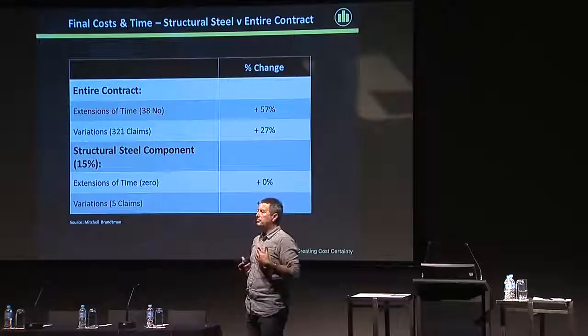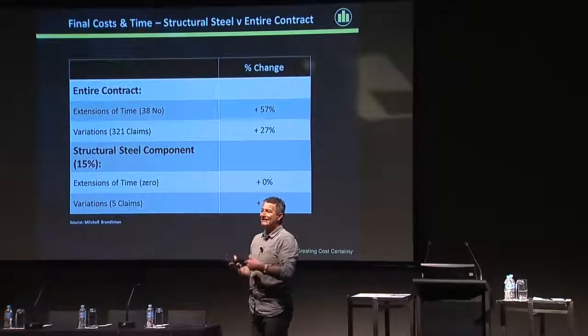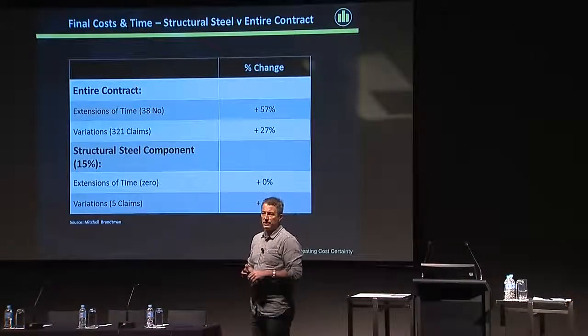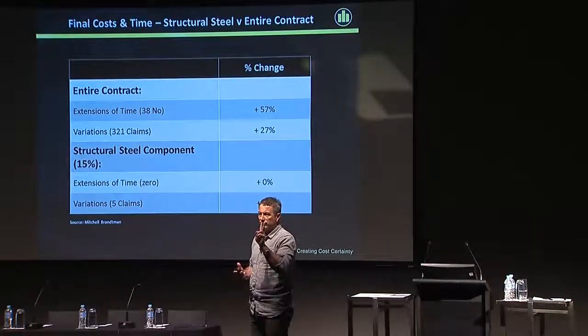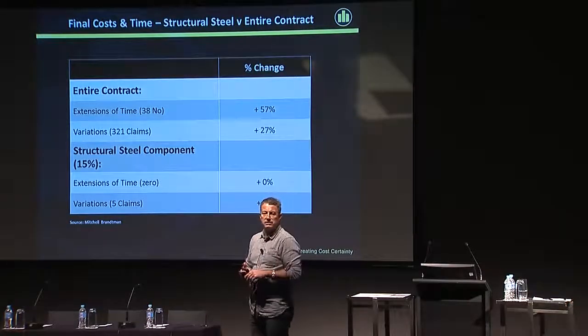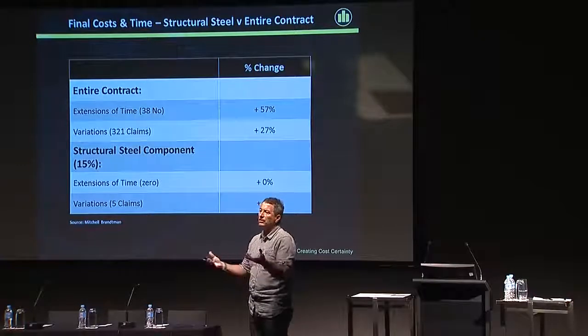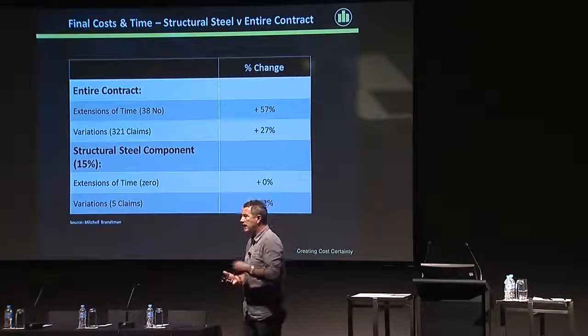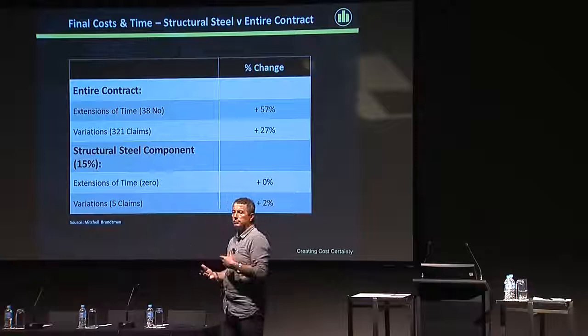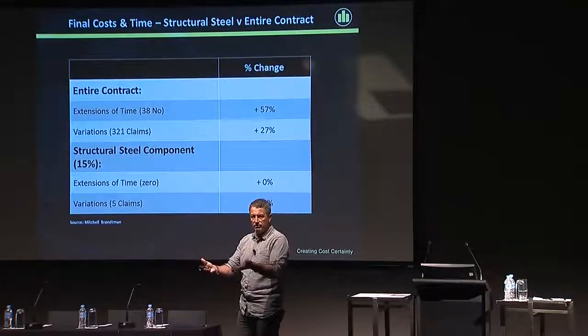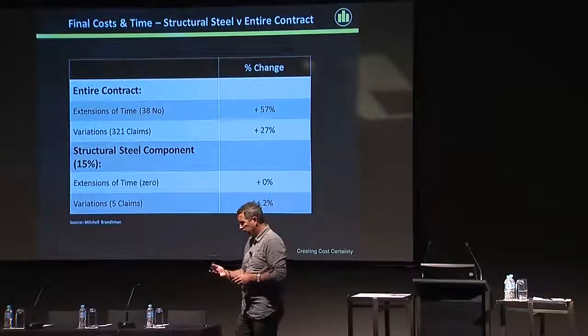In terms of the client's perspective, they were ecstatic because the project was under budget. Now, there were 2 reasons why the project was under budget. We had a significantly low bid contractor, and then the other thing was we had a significant contingency. And we had a significant contingency because it was an iconic building. And it was those 2 things that from a client perspective, it was all good. But in terms of the project, it was not so smooth.